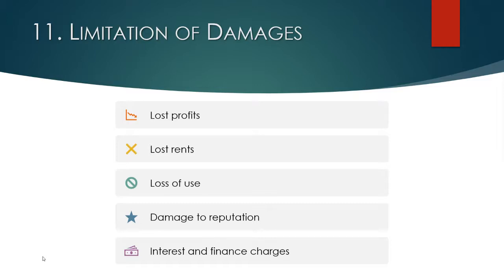So that's $14.5 million in damages on a project where Perini earned a $600,000 fee. As you can see, that's a really bad example of how this could go bad. In this case, the Perini case is actually what led the AIA to start including consequential damages waivers in all the standard A201 general conditions and the standard AIA subcontract. It's a great example of why those types of damage waiver provisions are so important.